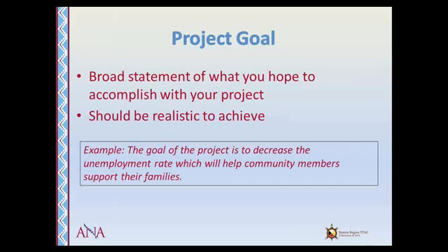When describing your goal, clearly describe how the project relates to one or more of the community's long-range goals. The statement should be brief and to the point as well as realistic. Remember, your goal determines the scope of your project, so do not state your project will accomplish more than it possibly can within the project time frame.